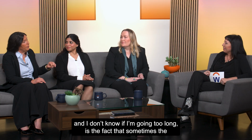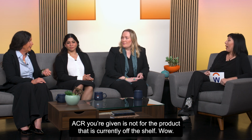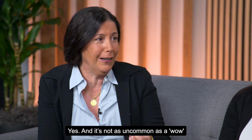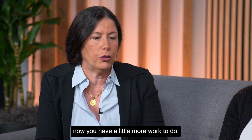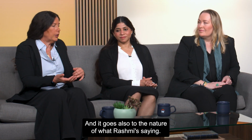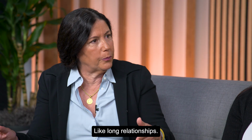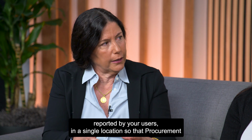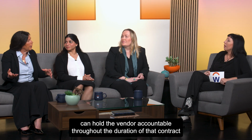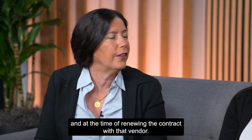One other thing with ACRs, and I don't know if I'm going too long, is the fact that sometimes the ACR you're given is not for the product that is currently off the shelf. Wow. Yes, and it's not as uncommon as a wow might indicate, right? So if it's not for the current product, now you have a little more work to do. And it goes also to the nature of what Rashmi is saying. It's a continuing practice. And you also mentioned that, right? Like long relationships. So it's important that you keep issues that you found, and issues reported by your users, in a single location so that procurement can hold the vendor accountable throughout the duration of that contract and at the time of renewing the contract with that vendor.